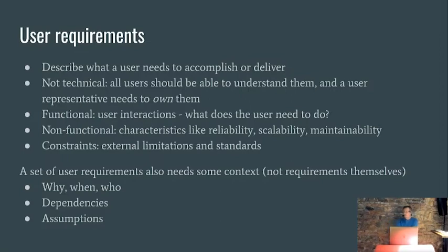And who needs this solution? Whose requirement is it? Who is the owner? Whose money is it, fundamentally? There will almost certainly be dependencies on other projects, on other technical solutions that already exist. And again, these aren't really requirements of the user, they are dependencies of the project. And it's also important to keep a record of assumptions. There are bound to be some assumptions, depending on how mature a particular project or idea is. The assumptions could be very general, or they could be very specific assumptions about numbers that need to be validated.